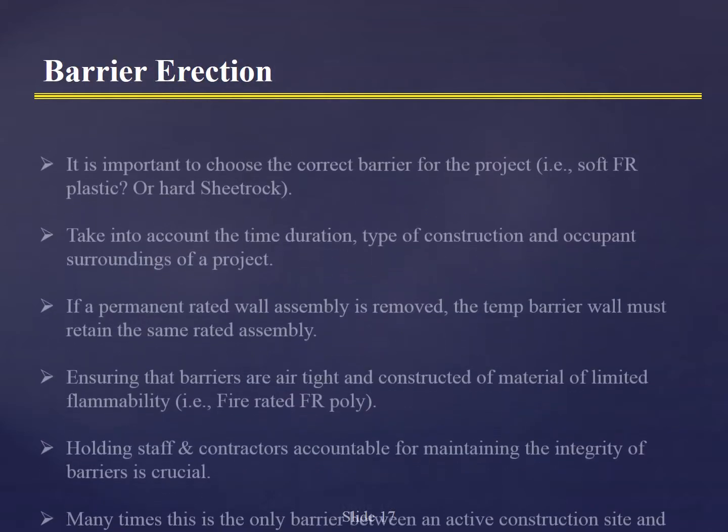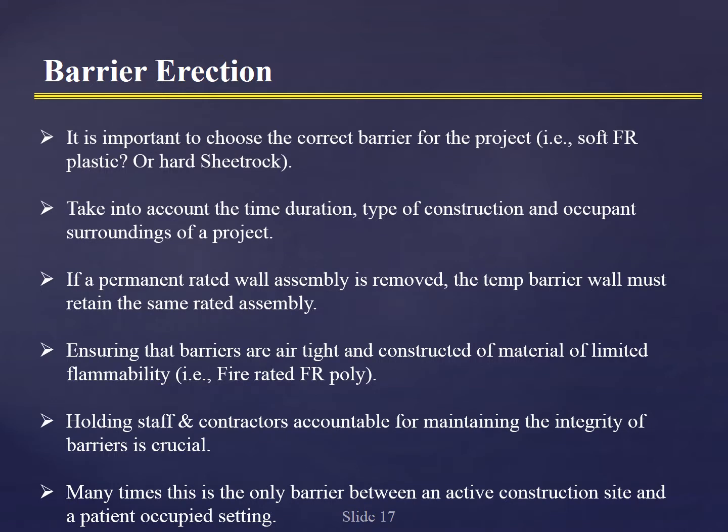When it comes to barrier erections, it's important to choose the correct barrier for the project. Again, I'm not going to say a whole lot about this. Anymore, solid barrier seems to be almost becoming the status quo for any project that's definitely level 3 or level 4. When it comes to construction infection scoring, you can use softer barriers on level 1. Well, you don't really need them for level 1, but level 2 type construction.